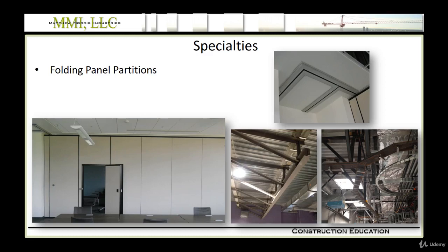And for example, in the bottom left photo, on either end of the wall, you would want some substantial backing behind the wall, such as multiple studs stood up, or even tube steel, for example, to take the impact of the folding partition banging into your wall. The weight of these panels is pretty substantial, and when someone's sliding it down the track, it can get some serious momentum, and you don't want to damage your wall.